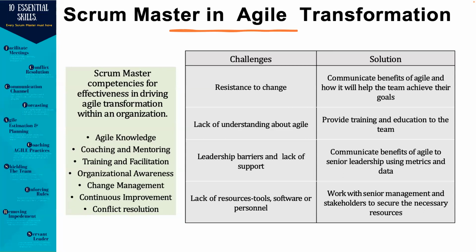But we all know that in launching software, features, or feature enhancements, you go beyond those teams. You're engaging marketing, customer support, and help desks. In quite a number of cases, those things are not agile. So as part of your planning, you have to really understand what works within those teams and make provision for it. The pre-production delivery process may be highly agile, but you have to keep in mind that you have to hybridize at some point, with a hybrid of agile and waterfall, especially towards the launch.